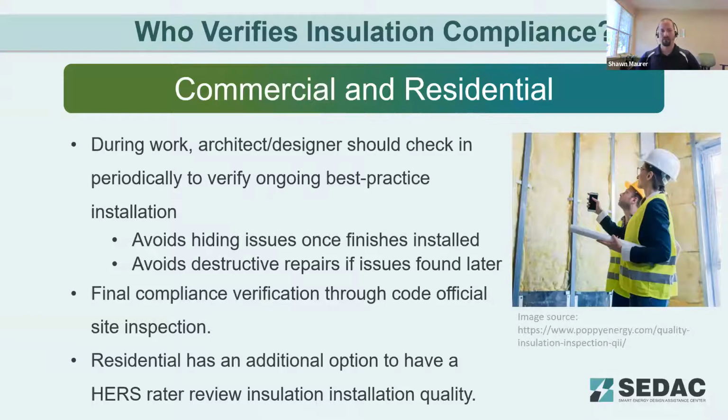So I kind of just touched on this as far as who's doing that verification. Some best practice ideas. During the installation work, it's best if the construction manager, architect, or designer is dedicated to quickly going out on site and checking ongoing work to make sure that best practices for installation are being followed and there aren't any issues.